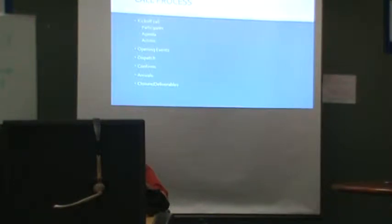It's going to ask you for a location list there. Then the questions around supplies, anything we need to bring with us. Say the tech needs to bring tape and boxes. Whatever they need to provide, we need to know about. If we're shipping anything, we have to know how we're shipping it, who's shipping it, and where it's getting shipped to. The supplies here are supplies outside of tools, non-basic tools, which would be up above.